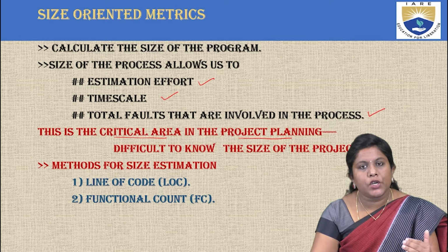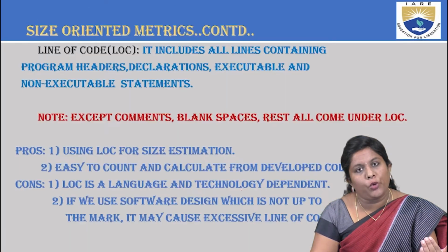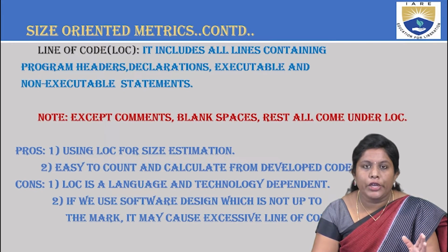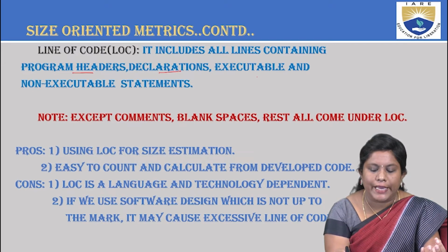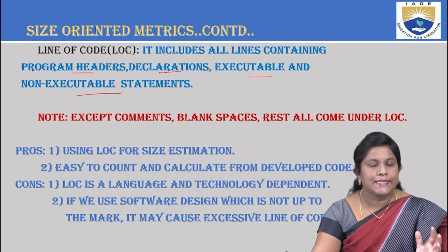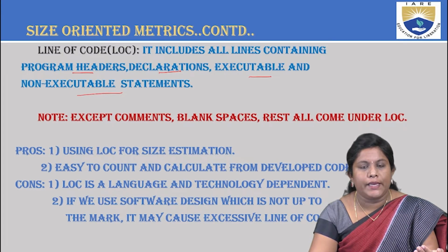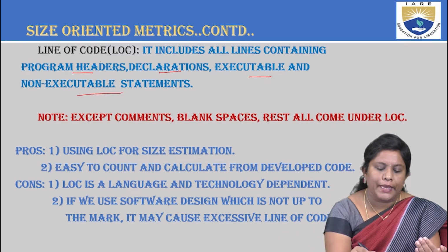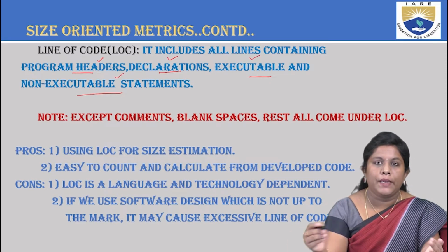So here our focus is on how to calculate the LOC and the function count. To elaborate on these two things, LOC includes all the lines of code along with the headers. That is the program headers, declarations, and executable and non-executable statements. So when you ask what the length of the program or LOC is, you have to include all these things: the program headers, the declarations, and the executable and non-executable statements.